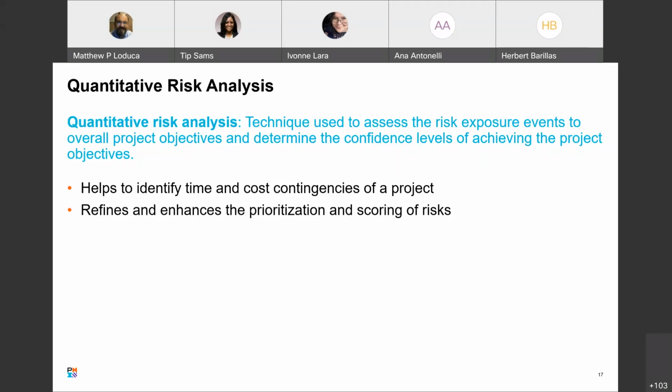And then, of course, you have the management reserve, and then we're getting to the unknown unknowns. It's kind of a risk that we don't know is a risk yet when we talk about management reserve. So primarily, the risk analysis, the quantitative risk, and any risk that we're talking about, generally speaking, applies to our contingency reserve, and the management reserve is reserved for the unknown risk. We know that there's going to be risk with pouring concrete. We don't know exactly what's going to happen, but we know it's going to be weather, or rain, cold, whatever. But we're not anticipating an earthquake, or a meteorite, or that the government's going to be overthrown and whatever. We're not looking at all kinds of other weird things that might happen to throw us off our game.